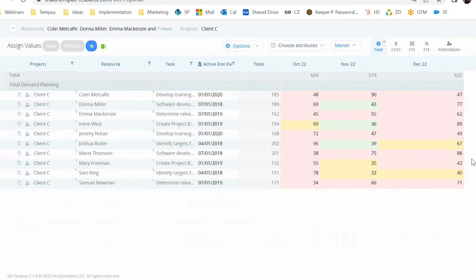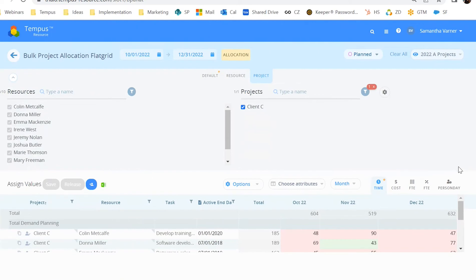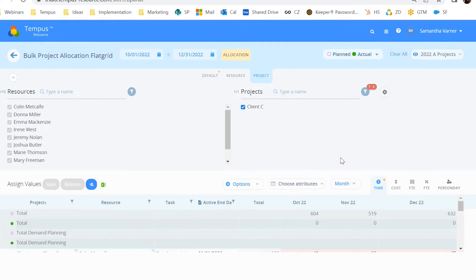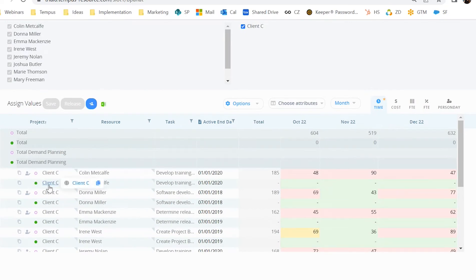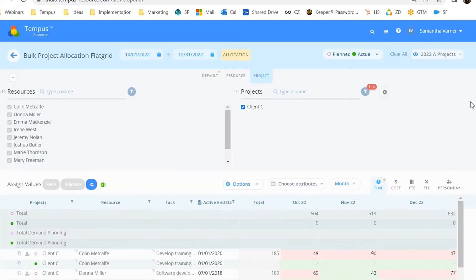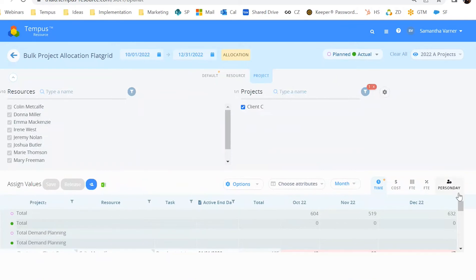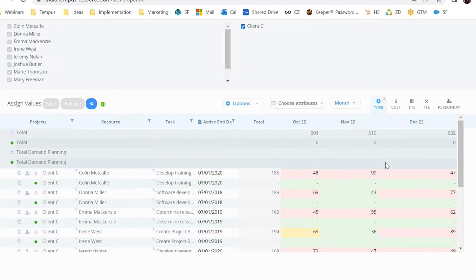The single project allocation grid and the flat grid are going to be how you make those assignments — this is where your users will spend a majority of their time. For those familiar with Tempest's timesheets feature, whether you are in the single project allocation grid or the flat grid, you can compare your planned allocation, represented by the red or pink circle, against your actual, represented by the green circle in the grid.